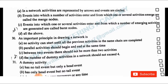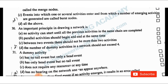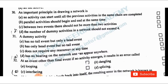An important principle in drawing a network: no activity can start until all the previous activities in the same chain are completed. Parallel activities should begin and end at the same time. Between two events there should not be more than two activities. Option A — no activity can start until all the previous activities in the same chain are completed — should be the answer.